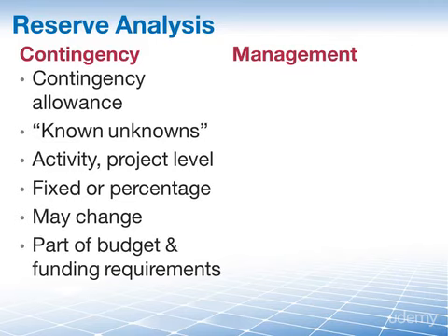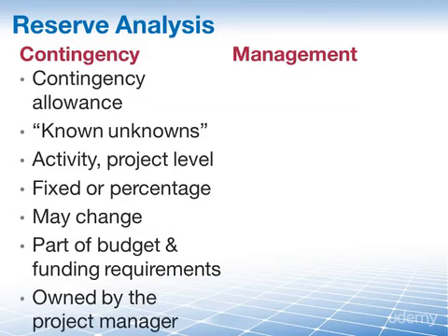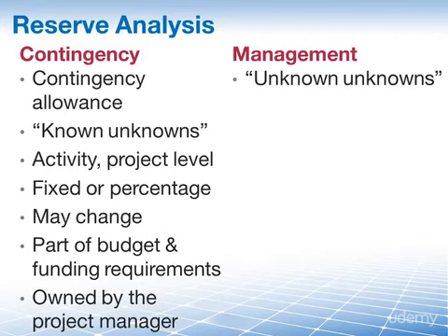It is updated as part of the cost baseline. It is part of the budget and the funding requirements of your project, and, very important here, the contingency reserve is owned by the project manager. Moving on to the management reserve on the right. It addresses the unforeseen or unknown unknowns, things that you couldn't come up with today that may just go wrong and impact your project.